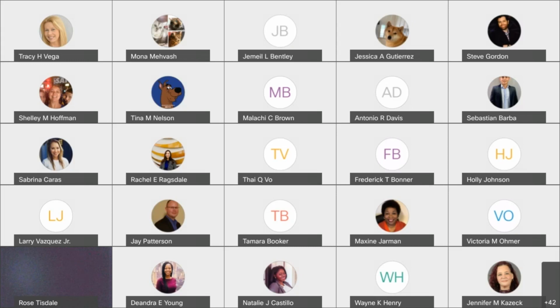Yep, because the stakeholder isn't just, people might automatically think a stakeholder is like a CEO or the person who's paying for the project, but it could be multiple people in the project. I was going to say something as simple as an apartment building that's getting a new parking lot. So you automatically think, okay, well, the people that live there, but it could be the people that work there. It could be the people passing by. It could be the people that have to work on the signs, people that work on the lawn, the people that are delivering things. Those are all stakeholders because everybody's affected by the project.